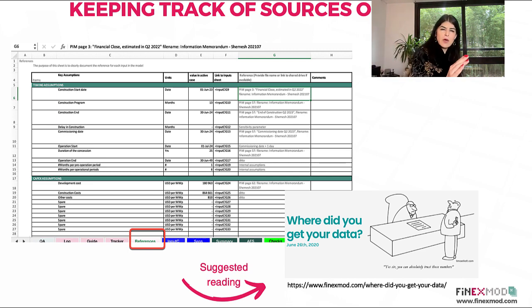For example, if they have 12 months construction, and it was just an assumption that I saw in their project info memo, they mentioned that based on previous experience, we have assumed a 12 months construction period. But since I maybe had experience previously working on a similar project, or maybe I did some benchmarking and read some technical documents, I understood that for a project of that scale, 12 months might be a little bit optimistic, and maybe we want to consider 18 months, okay?